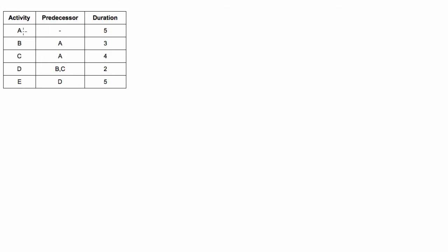Let's do a rough draft where we would have activity A. Let's do it up here. So we know that we're going to have activity A as the first activity, then B and C depend on A. They can't start until A is done.